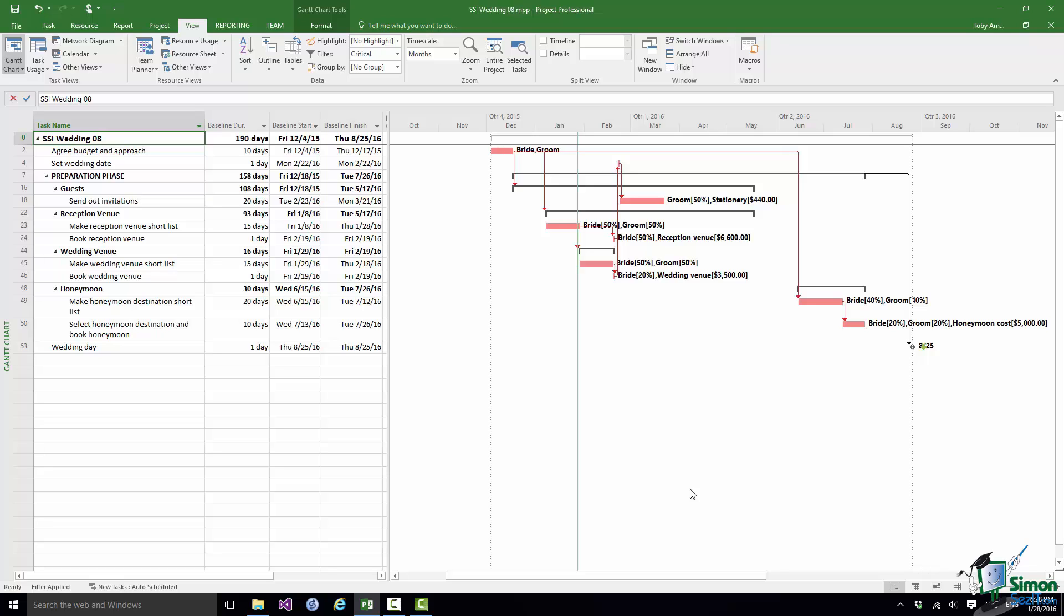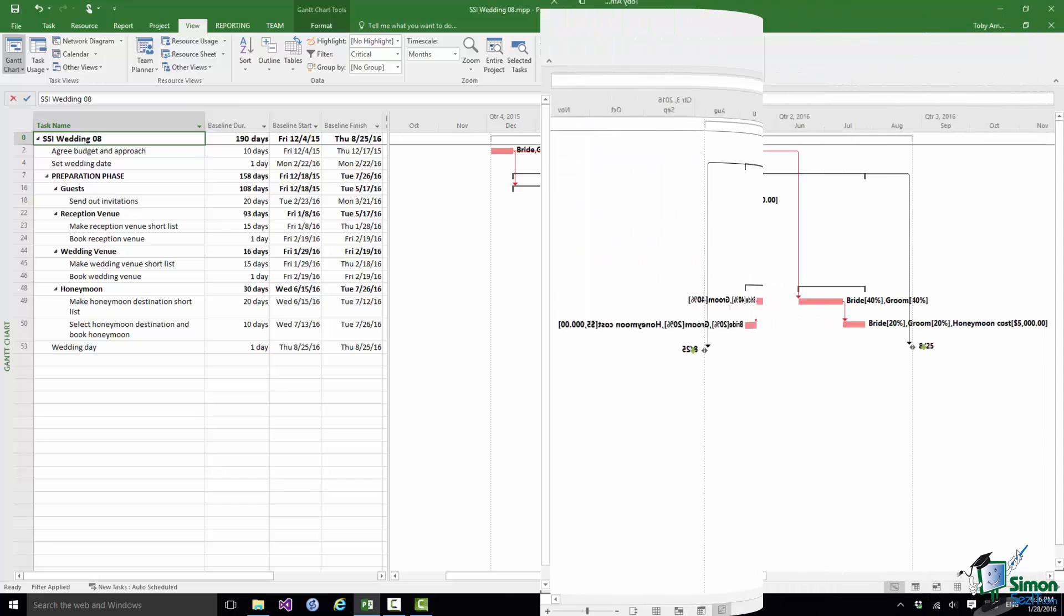So in many ways this particular project schedule is quite unusual. The critical path is quite unusual because of the number of gaps but there are reasons for those gaps. And you will tend to get gaps, for example in projects where you have a lot of resource issues and also where there isn't a very definite sequence through the project. You've got a lot of things to do over a period of time but the sequence isn't as well defined as it is say in the bathroom refit.